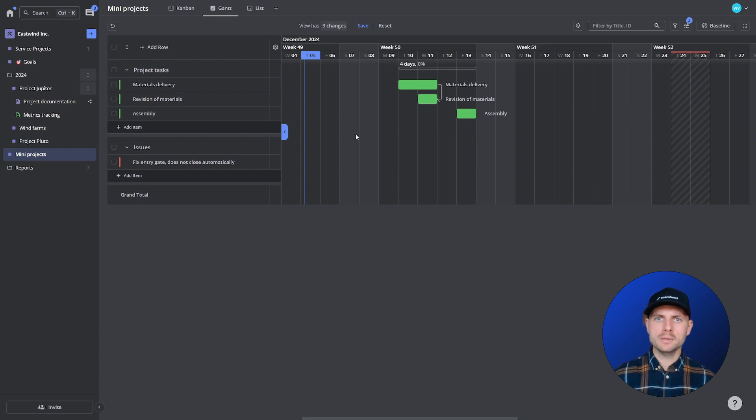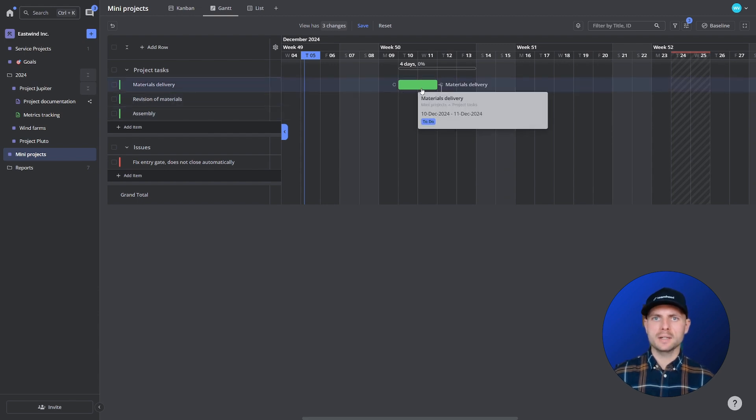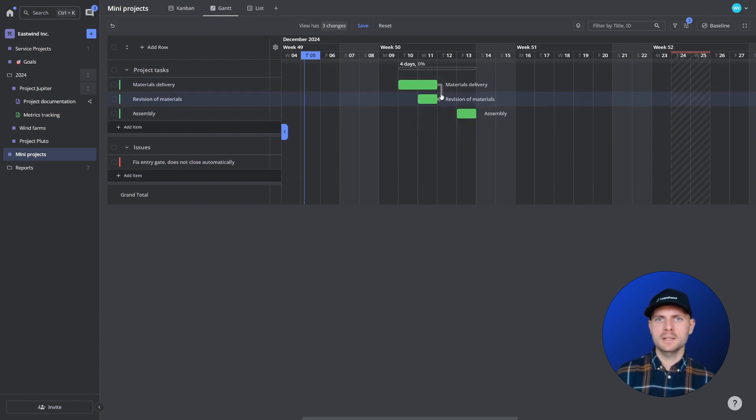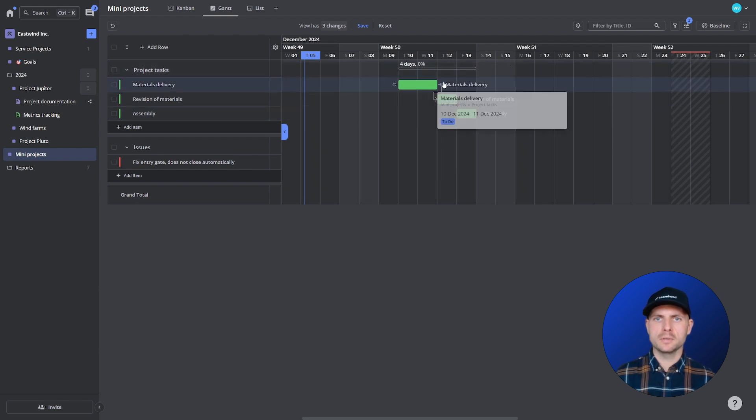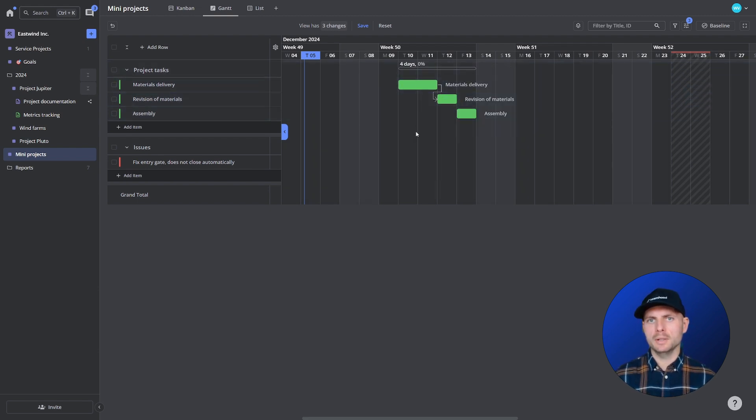Now if I cannot do that and I can start only the next day I should change the dependency type into finish to start, which helps me model the correct order of things.